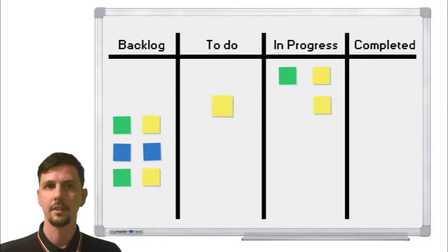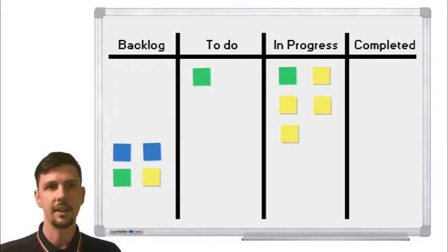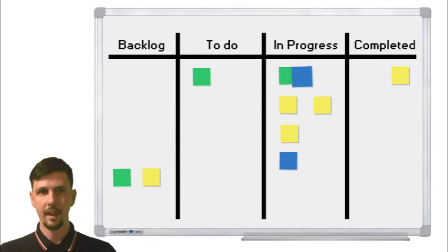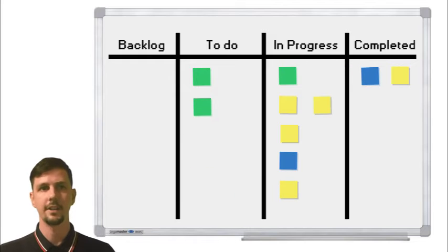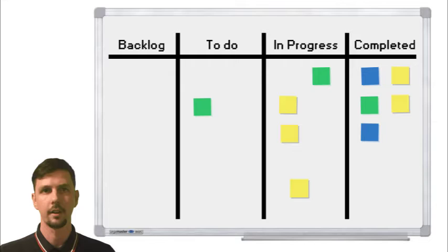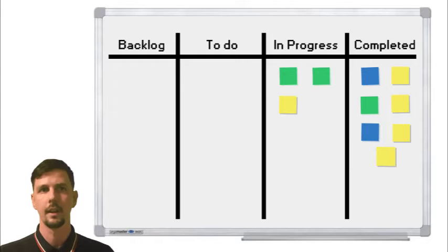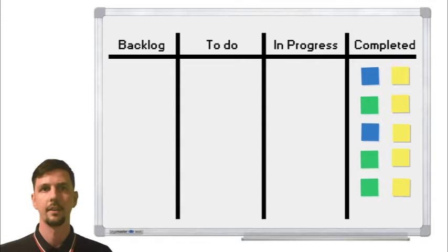All the tasks required to complete a project are placed into the backlog, with the most important being placed at the top. The Kanban journey has now begun. Each owner of a card begins to move their task to the neighbouring column dependent on their current capabilities and workload. The tasks shown on the card are then worked on by the relevant department until they have finally reached the completed column.